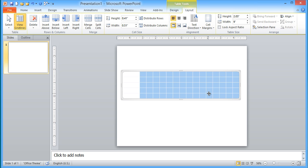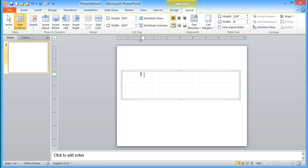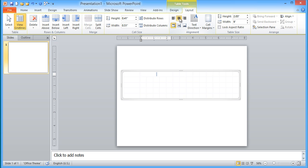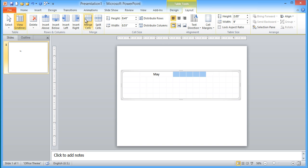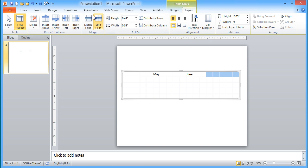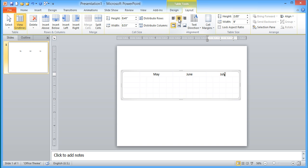So now we've set up our columns the way we want them to. Now what we need to do is we need to set the months at the top here. So what I'm going to do because we said we're going to have five weeks for each month. So I'm going to select the first five cells in this first row and I'm going to say merge the cells and I'm going to center it. And I'm going to type in May as the first month of this project. I'm going to select the next five, again merge the cells, center it, June, and then my last month here, merge center and type in July.